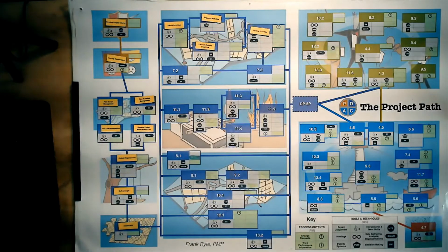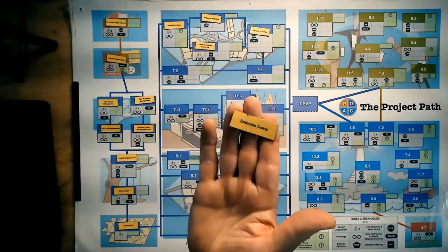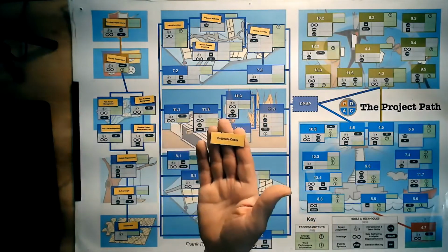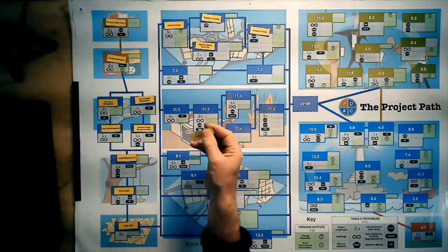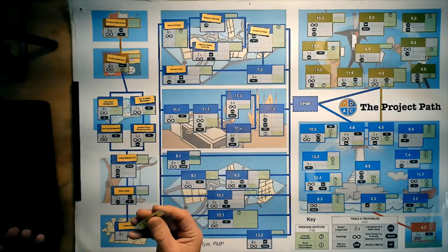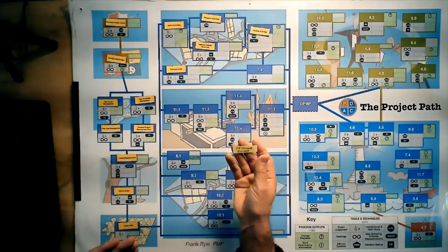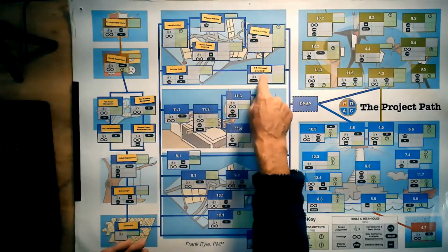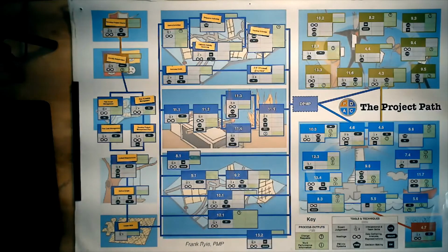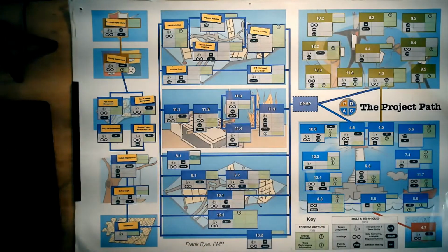Now, I suppose in parallel with that, and depending on the type of project you're working on, you need to estimate the costs. And for some, cost is a driver, for some, schedule is a driver, for some, quality is a driver. You understand that idea. But we can estimate the costs based on the work breakdown structure, and then we can aggregate those costs together and put them in the timeline based on the schedule, and we will determine the budget. Apologies, that one was stolen by my dog, but you get the idea. We determine the budget there. Okay, so the budget is the allocation of the money over time, and therefore it comes from the schedule.